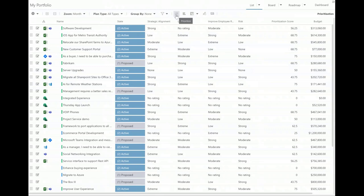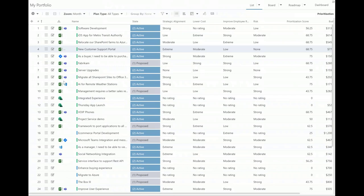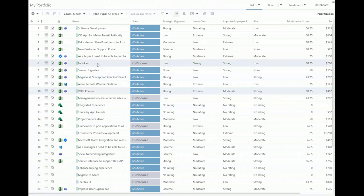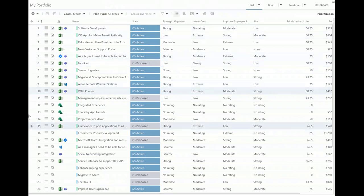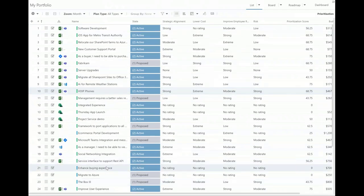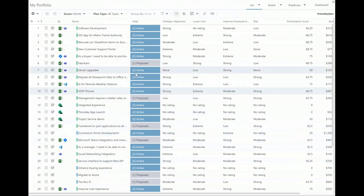I'll flip this into prioritization mode, and now I can simply drag and drop to update prioritization. If I see a high-score item way down here, I can drag and drop to move it up to the proper place. Maybe the CEO really wants this one done — even though it's not the highest prioritization score, I drag that up. Or this one's a compliance project we have to do regardless. So you can drag and drop to create a stacked rank of all your projects, highest ranked at the top, lowest at the bottom. As new things come in, you can continue to readjust — every month, every quarter, as frequently as you want.